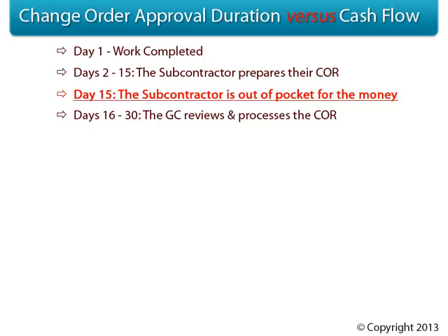If there are 5 subs involved with an issue and one of them is negligent in providing their pricing, all the rest of the subs have to wait. I've seen a single sub hold things up for months, and it's not fair to the other subs involved, but it's an unfortunate reality in the industry. Now, I don't want to get sidetracked here, but we are going to talk about how to deal with these delinquent fellow subcontractors a little later in this course.